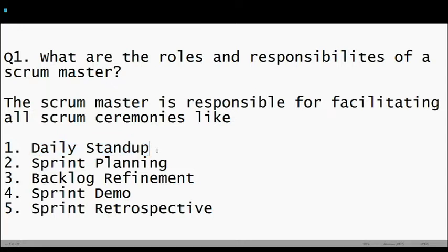Generally, many teams, in my experience, have a tendency to go into refinement during the daily stand-up, which is an anti-practice, an anti-agile, anti-scrum practice. As a Scrum Master, it is your job to keep the product owners, stakeholders, and all the team members on track to answer just 3 questions. What did we do yesterday? What are we working on today? And what are the impediments you're facing?